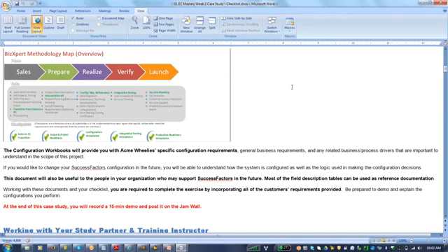Then the business stakeholders decide whether it is a go or no go, and then you go live, do go-live activities and go-live support, and then hypercare support for some time. Then you take a sign-off, and the project is officially closed, and it is business as usual after that.